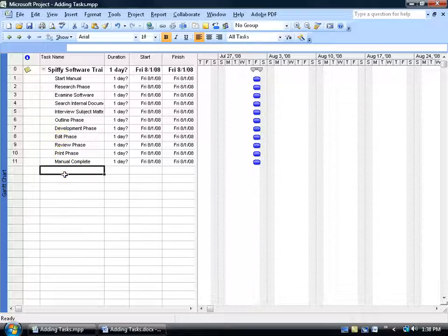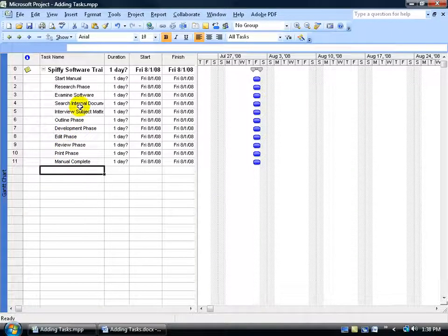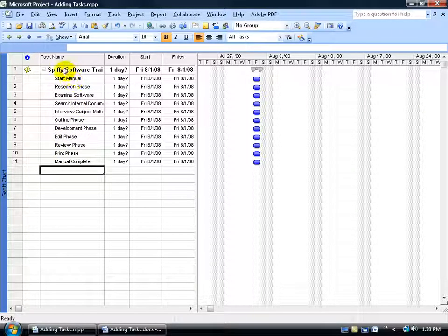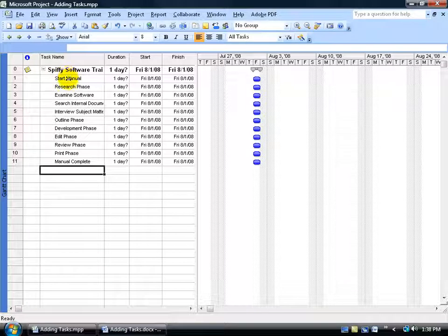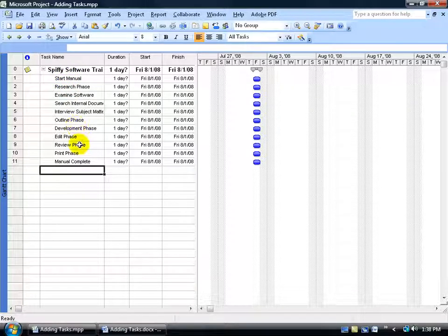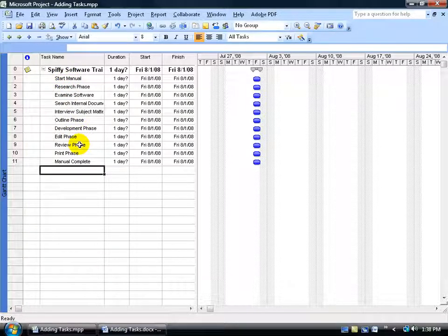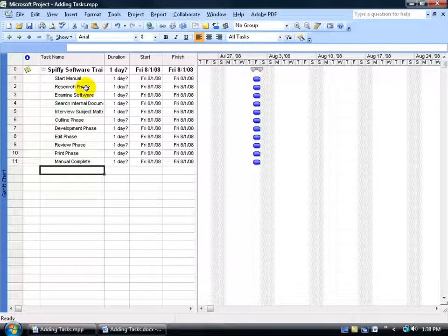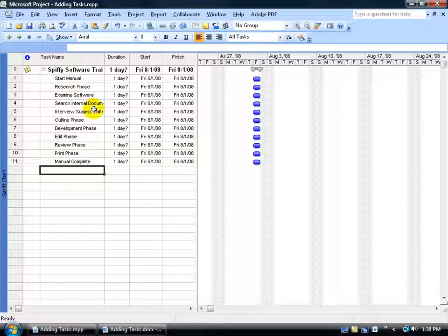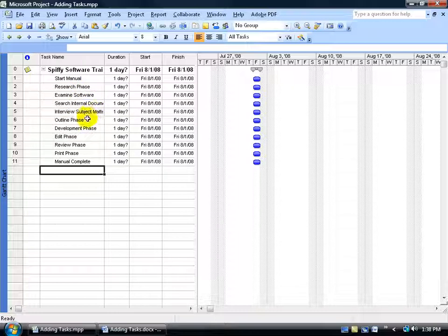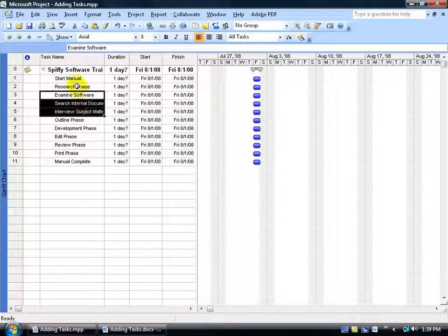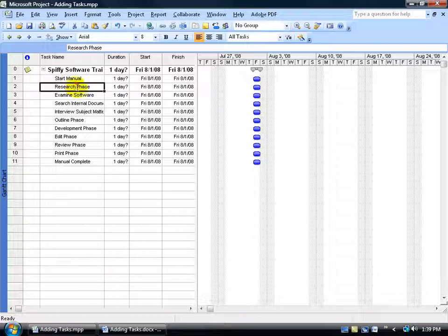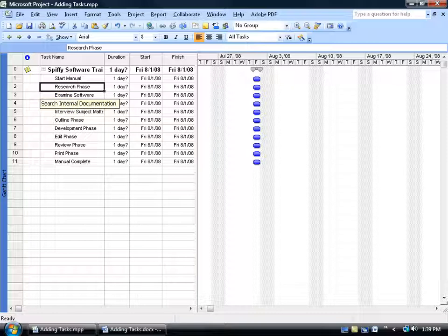Now moving along, you'll notice that it's in bold, it's up at the top, it's our goal, it's the overall project goal. And in order to complete our goal we have to complete all these mini sub-tasks here. Including summary tasks which are the summary tasks of sub-tasks. So when you look in the hierarchical structure, you've got your sub-task to this summary task, but this summary task is to that summary task. So yes, you could have summary tasks within summary tasks.